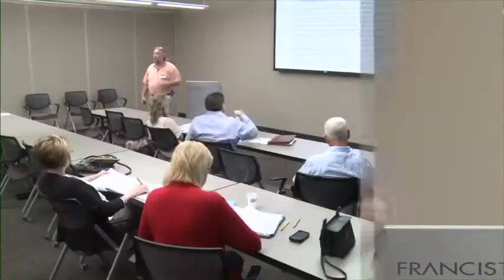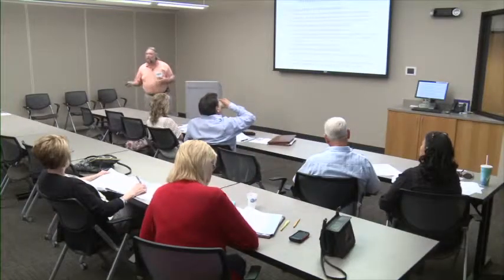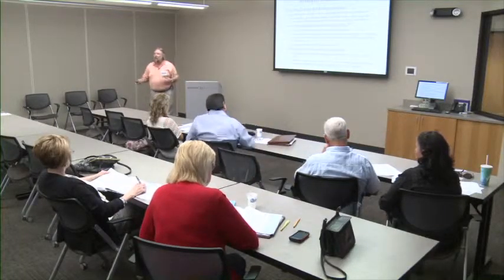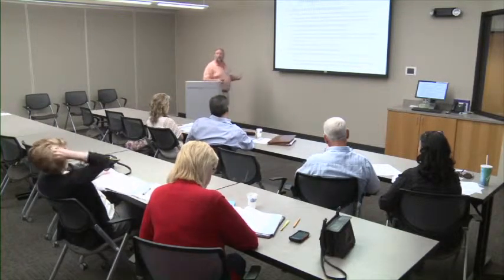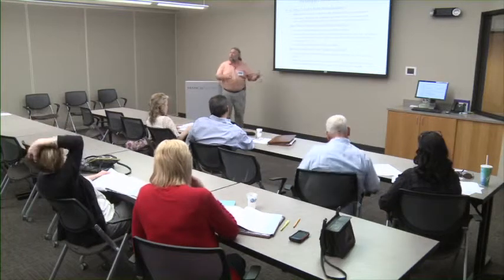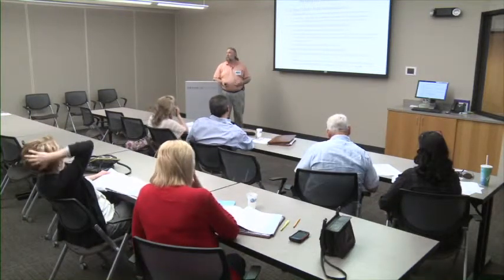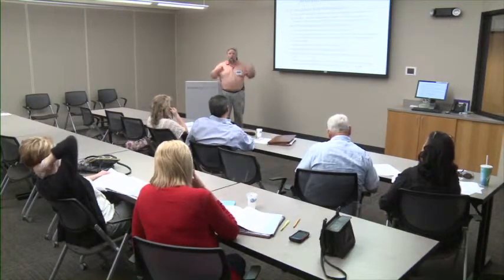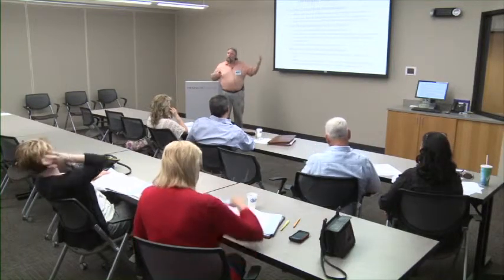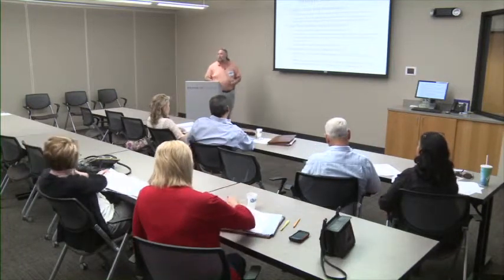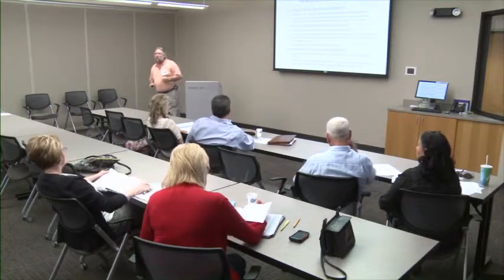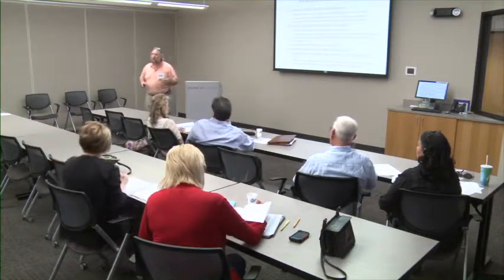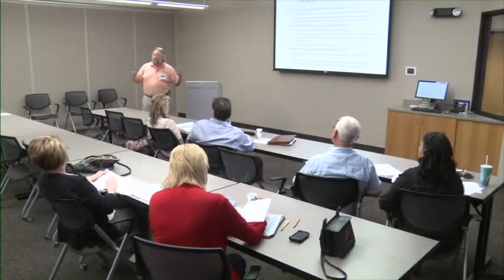So if we use up the extra time that's free, that's not on the critical path, then we've put it on the critical path. So we're not only monitoring this critical path to make sure we hit the right time frame, but we want to look at the things that are near it. So when something goes wrong, not if, when something goes wrong, we can make that adjustment.